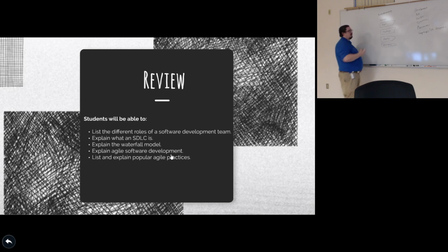So in Waterfall, do they ever happen in a different order than what I put on the board? Can I go through them out of order? I cannot. In Waterfall, they have to go from the first thing to the end, and you can't skip. In Agile, typically we do these in tight little loops, where especially with Scrum, one sprint is going through that whole process. So we're going through that whole process in a very short, compressed time, in maybe 1 or 2 weeks. Okay.